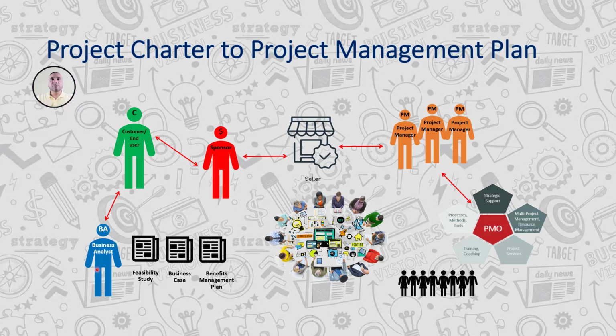Now, business analysts prepare another document called the business case for that selected project, which contains the reason why this project is selected, and also the benefits management plan, which contains the financial feasibility of the option: what will be the benefit to cost ratio, what will be the net present value, present value and future value of the money which is going to be invested, what will be the payback period, what are the constraints, and what are the assumptions they are making for this feasibility study.